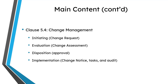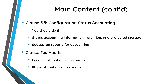There's also the disposition, which is the approval of the change, and then there is the implementation — I think of that as the change notice — the different tasks to implement the change notice, and then the audit to make sure that the work that was completed meets the intent of the original change request.